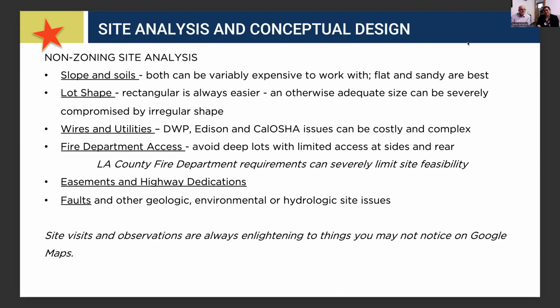Fire department access. Learn from experience: you want to meet with your fire department as soon as possible to see what the access is to your design. Based on that original feasibility study or yield study, you look to see, because nowadays, especially if it's a larger site, chances are you're going to have a fire department access lane. If you don't already have a plan for that, that's really going to make you have to rearrange some things.